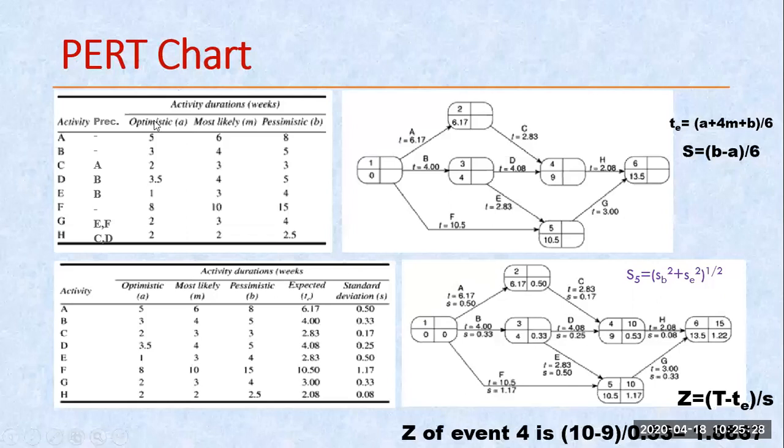So whatever we have discussed right now, that is my CPM. In CPM, a single duration is given to me. But in my PERT chart, 3 different durations are given. One is known as optimistic, then the most likely, and the pessimistic. So these are all estimates. But instead of a single estimate, in this we have 3 different types of estimates.